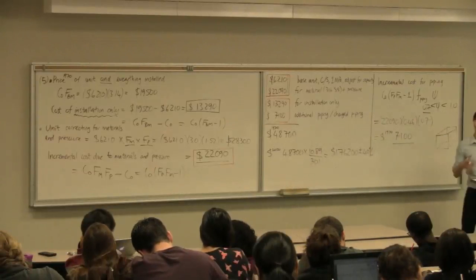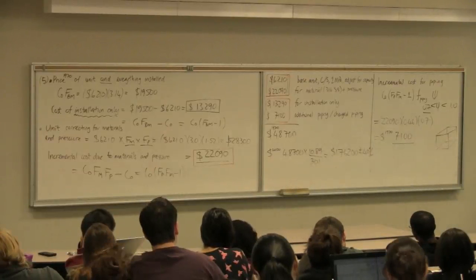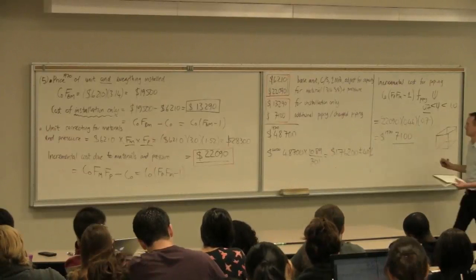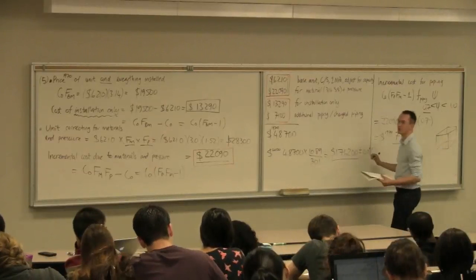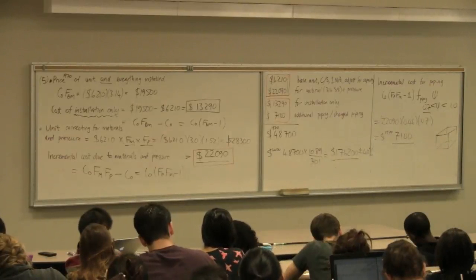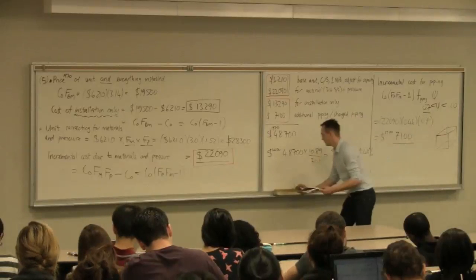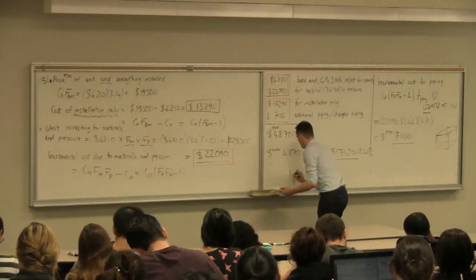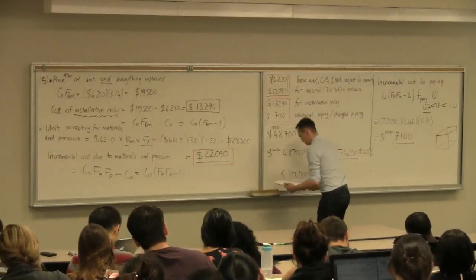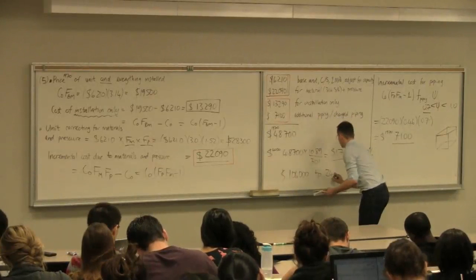So very different to that 321,000 figure that we naively estimated at the beginning. And so it's very important why we go through this additional complexity to get a more refined range. And if you report that range, which is the final step, it would be 106,000 to 247,000.